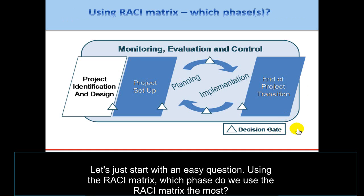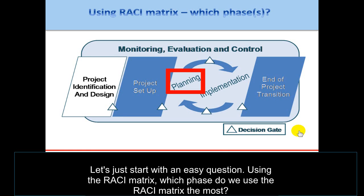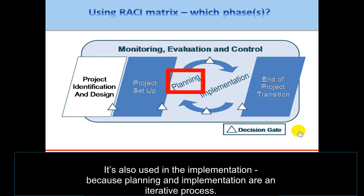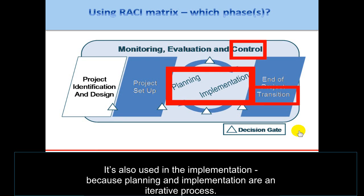Let's start with an easy question. Using the RACI Matrix, which phase do we use it the most? It's in the planning phase that we use the RACI Matrix the most, and it's also used in implementation because planning and implementation are an iterative process.